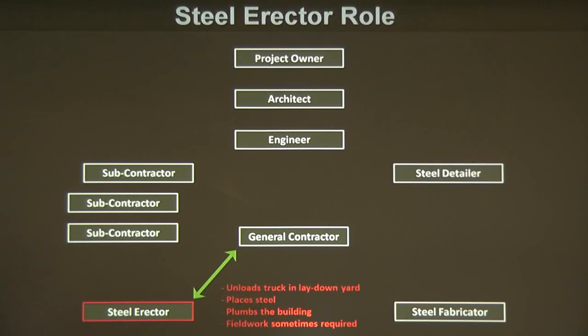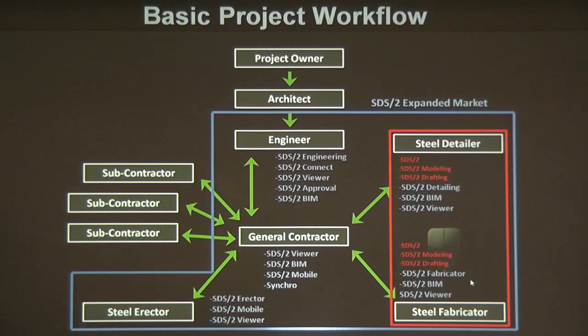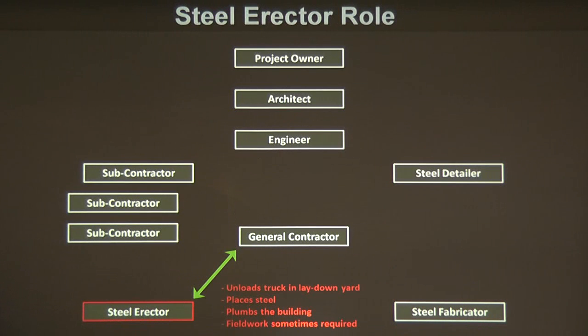If you can advance to the next slide. The other profession here that you might not hear too frequently is the steel erector. And we do sell quite a few stations of SDS2 to this group because we have an SDS2 erector package, and we're going to look at putting a crane in the model and determine how far the crane can reach and how heavy a load it can pick up at that certain reach. That's the level of information that's getting added to these models anymore. And if that didn't interoperate, I couldn't pass that to Navisworks to check whether I put the crane in the proper location.